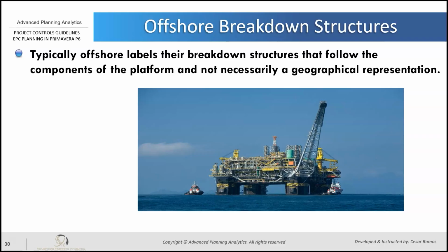It's usually three legs of segments: offshore, onshore, and subsea, possibly pipelines, turnarounds, and upstream or downstream is the terminology you'll hear. But here we're going to go over the offshore breakdown structures. So typically, offshore labels their breakdown structures that follow the components of the platform and not necessarily a geographical representation of the work.